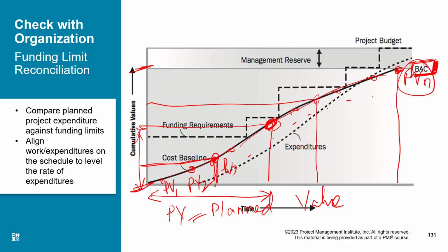As I said, other contingencies like the allowance in the work packages or allowance in each activity are already catered for in the S curve. And naturally, only if they have consumed all the reserves of the work packages and the activities will we require to get money from the management reserve.